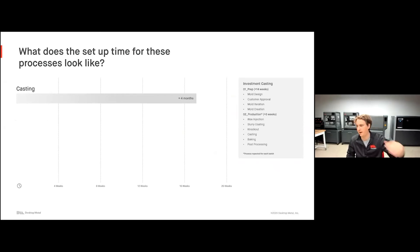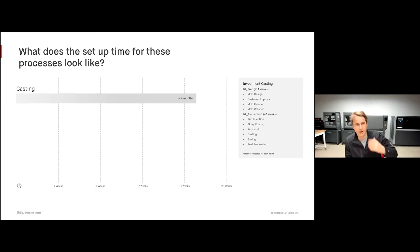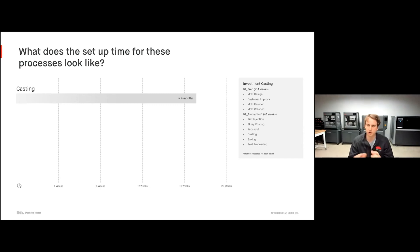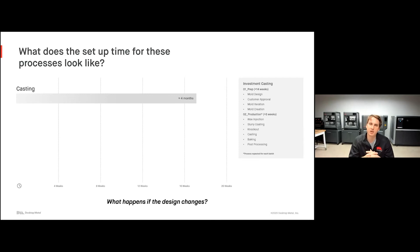I want to make a quick comparison between casting and the binder jetting process. For casting, customers generally say the setup time from design finalization to actual production is about four months — roughly fourteen weeks of prep between mold design, customer approval, iteration, and actual mold cutting or creation, followed by the investment casting process: wax injection, slurry coating, knockout, casting, and baking, plus quite a bit of post-processing. Now, if the design changes, this timeline greatly extends because you have to start these processes over — and many times you may have to start completely from scratch, incurring lots of costs and lead time.